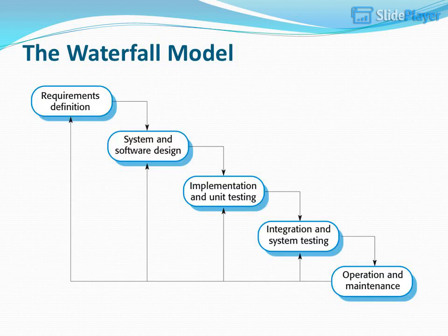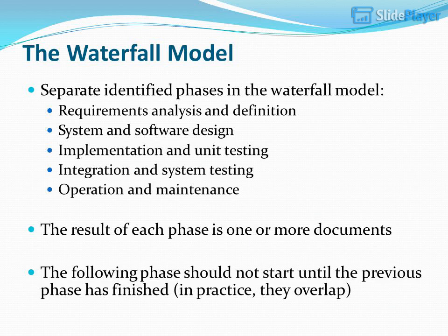The waterfall model. Separate identified phases in the waterfall model: requirements analysis and definition, system and software design, implementation and unit testing, integration and system testing, operation and maintenance. The result of each phase is one or more documents.